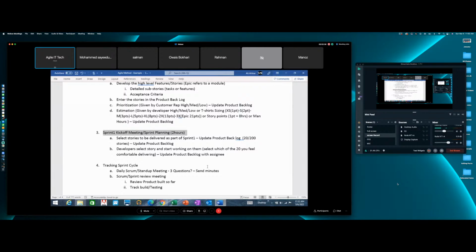While the team is working on sprint 1, the BA is not only trying to clarify any questions that any of the developers may have on sprint 1, but he's also working with the product owner, or the product owner is working with the business stakeholders, to complete the storyboarding on items that he would like to do for sprint number 2.